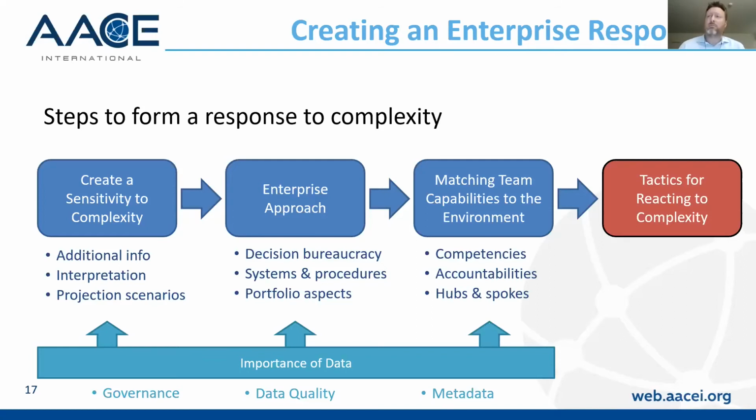So coming back to structural complexity, this may include reviews of team sizes, how activities are grouped, how knowledge is managed. If it's technical complexity, the tactics might include things like design prototyping, iteration controls, or revisiting the design planning process. For directional complexity, this might be an executive steward or a PMO that's helped to support the team. Process or time related, this may involve focusing on missing information and then trying to confine the impact that this has on a project. So again, it's combinations of business, project, and how it's reacting to the environment that it's in.